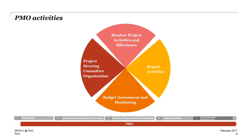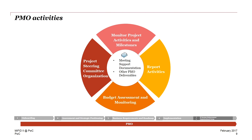We also recommend implementing strong regular project steering, including reporting to different project board members — especially the steering committee and the management board. All in all, it is necessary to have proper documentation of all project work, as several internal organizations will regularly demand the project status and progress, for example the compliance function, internal audit, and the management board. Furthermore, external auditors are likely to ask you for information about MiFID 2 implementation work as well. Please take care of proper and complete documentation, because each of your stakeholders might ask for assurance whether the implementation of this huge regulation will be completed in time. All these activities should be covered in PMO services.